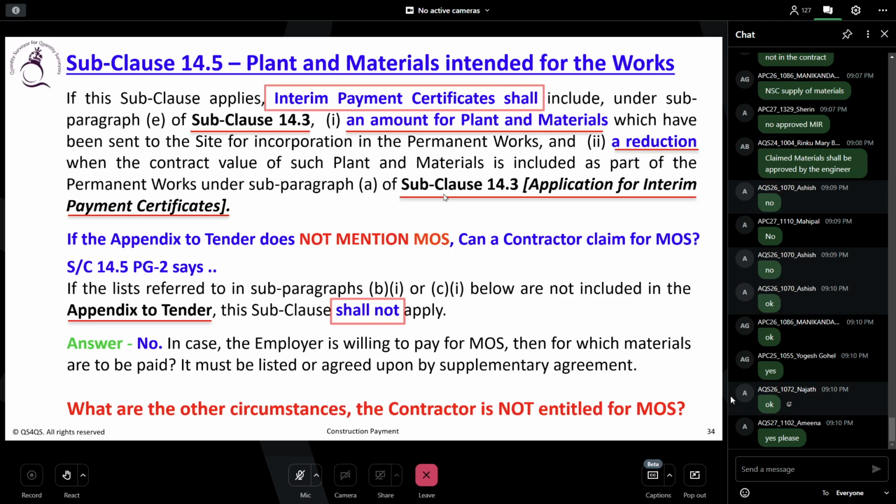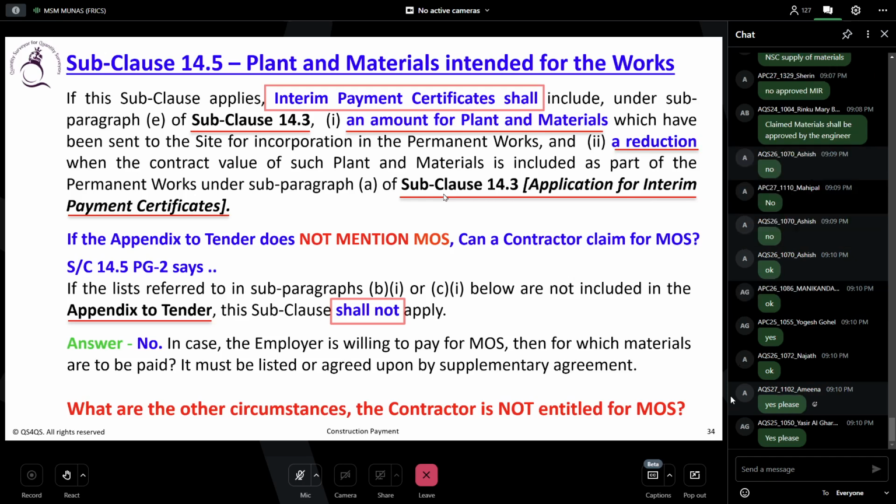So be careful. That wording is schedule of payment. It is for a lump sum contract, note down if you want. Under the 14.4, schedule of payment is a lump sum in lump sum contract. Note down. Yeah, you might understand. Later, you might not get confused. In the lump sum contract, if you have schedule of payment, then you can't apply for a material on site for that kind of works. Okay, ultimately, it's trying to give the hint for you. For a lump sum contract, don't pay the material on site. This is what this FIDIC is trying to say.